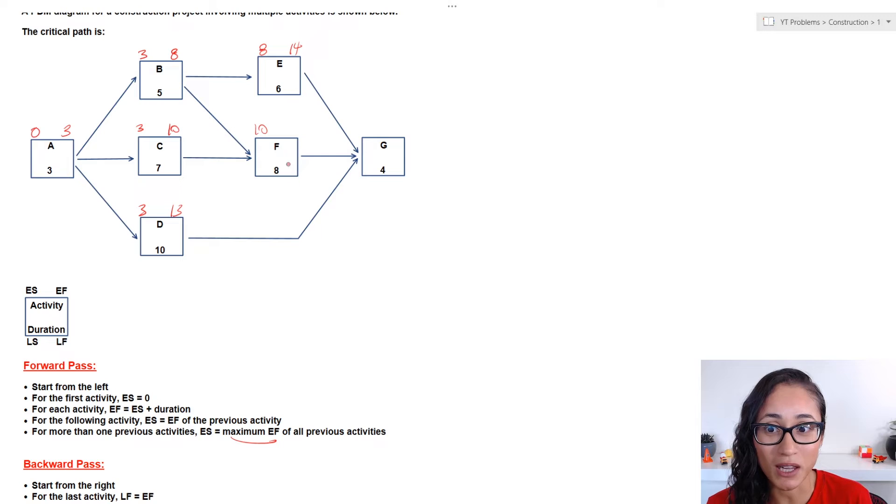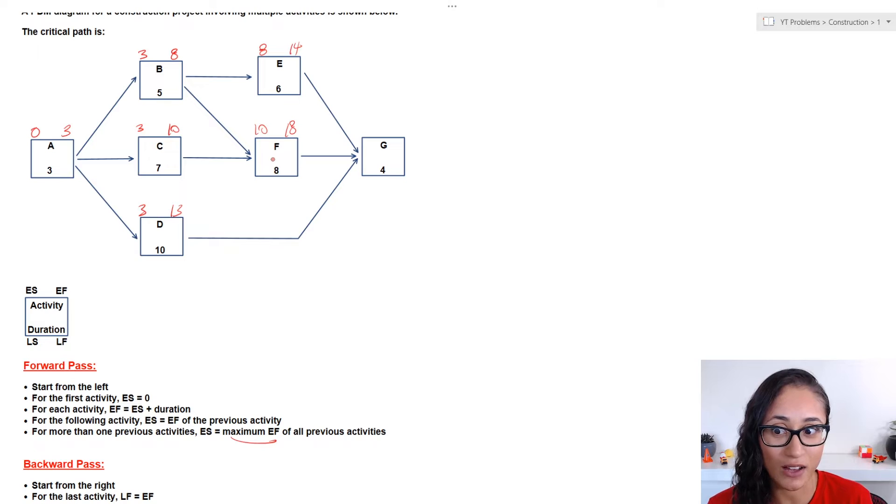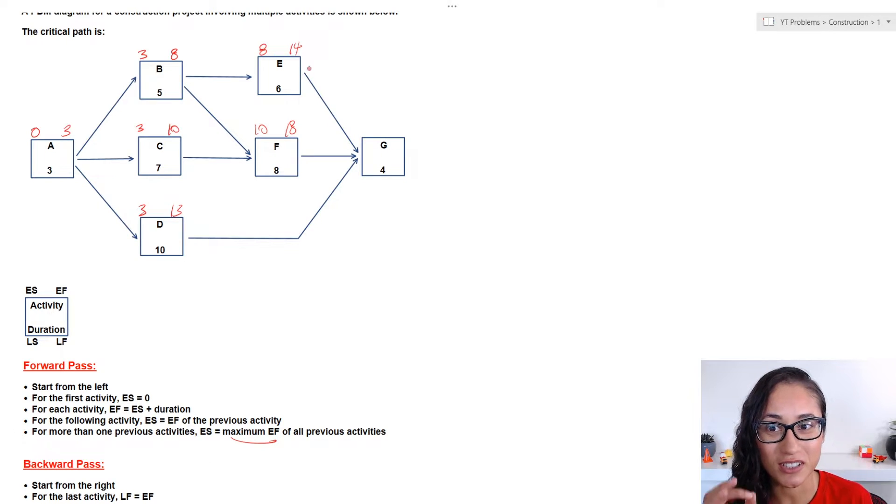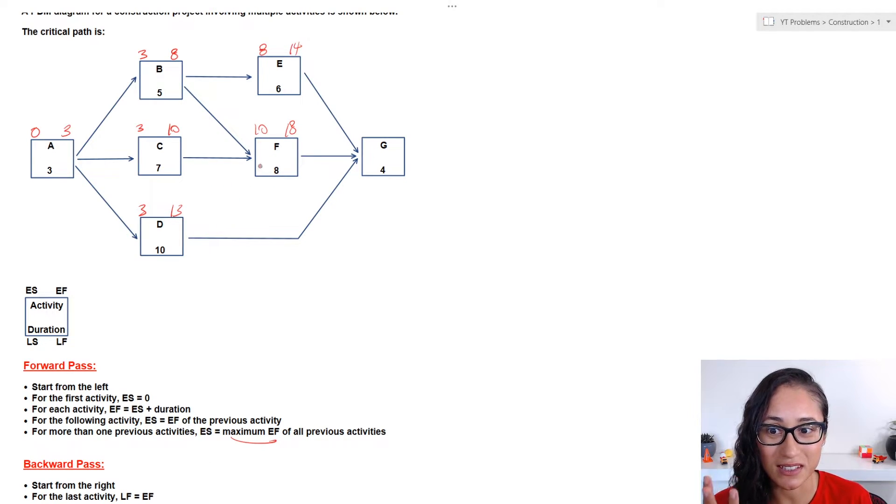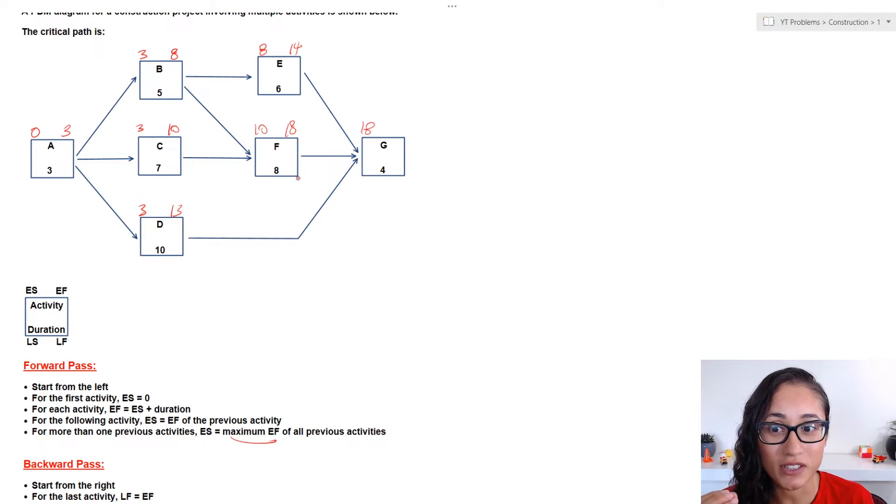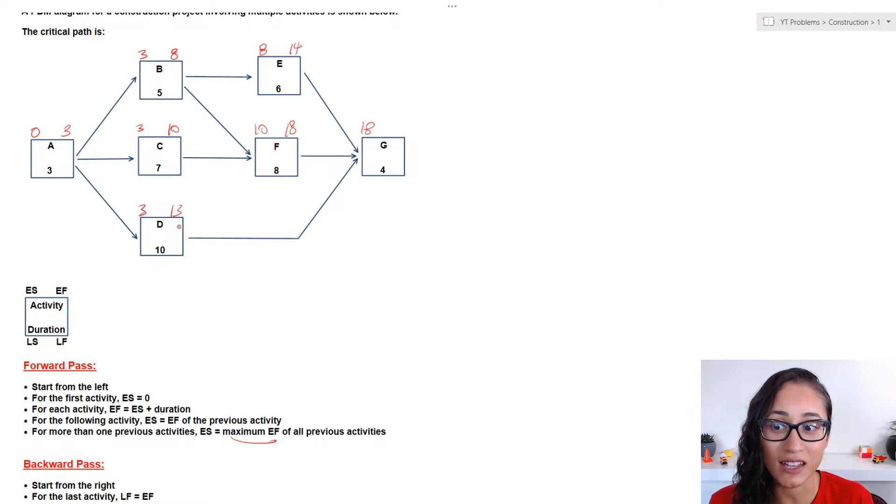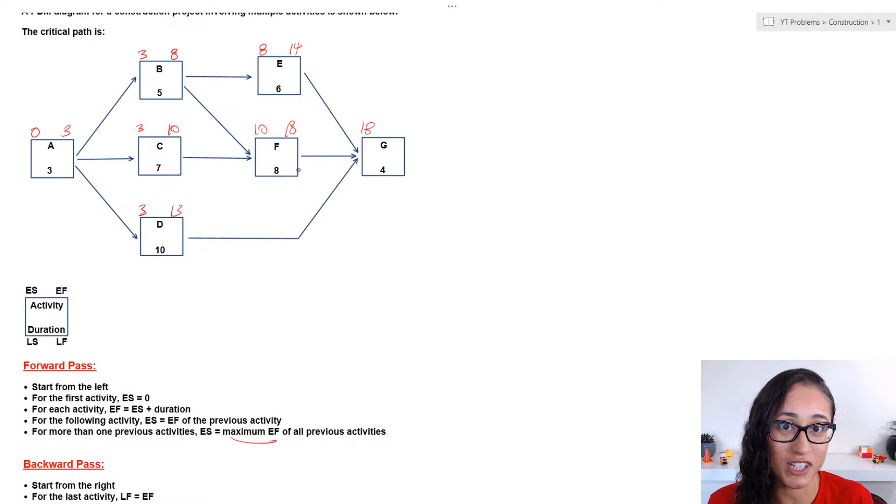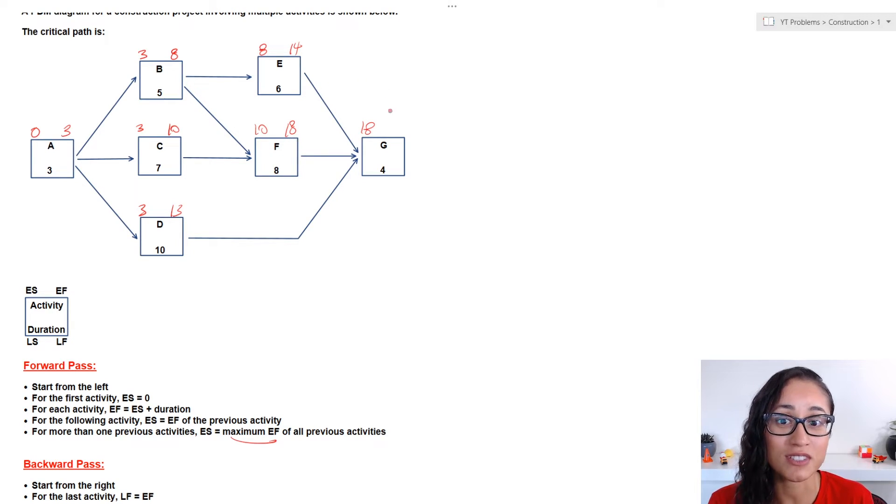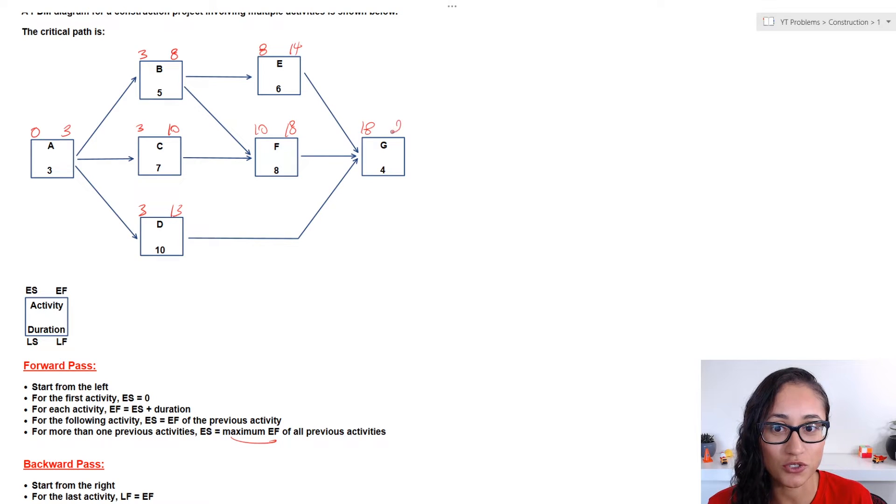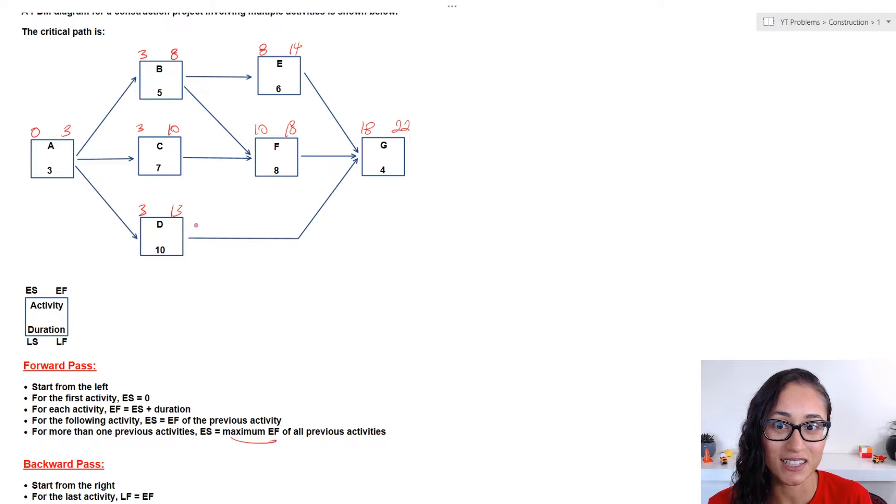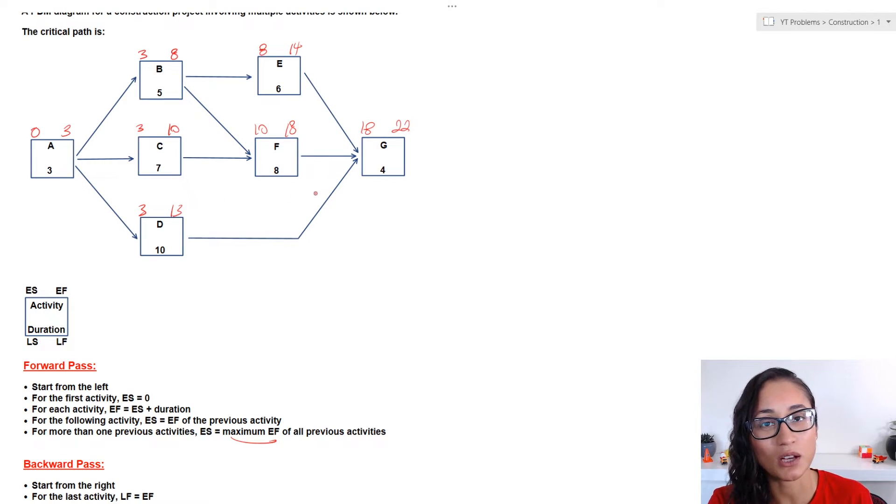Now, ten plus eight gives me eighteen, and so that's going to be the early finish for activity F. Now, for activity G, it's dependent on three activities, E, F and D. Again, we have to pick the maximum early finish. And that's because all these activities have to be done before G starts. So, if we start at thirteen, F hasn't finished yet. So, we have to wait till activity F finishes, then we can start activity G. Now, eighteen plus four gives us twenty-two, and twenty-two is our early finish for activity G. Now, this is the forward pass.